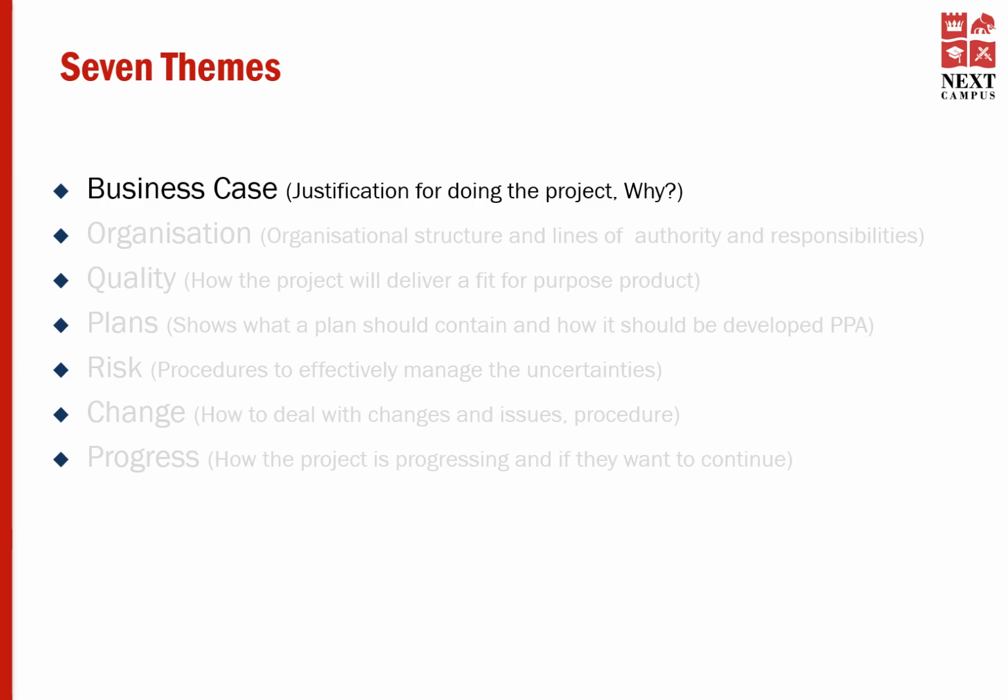The business case should be updated at the end of each stage to include the latest cost, time, and product information, and to verify that the business case is still valid. The PRINCE2 manual provides a product description for a business case, and you may search for that.